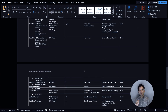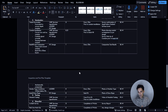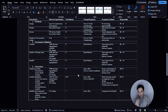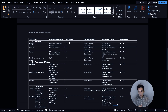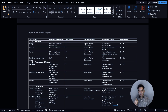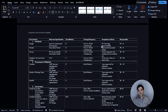ITPs go through all the steps in the process — the different construction activities — then the specifications that apply to that activity, the test method that's going to be used, the timing and frequency of the testing, the acceptance criteria, and who's responsible for performing those checks.